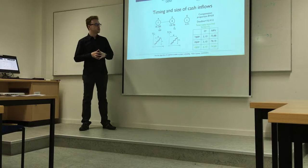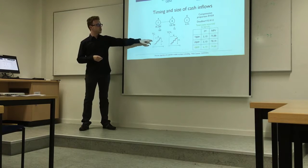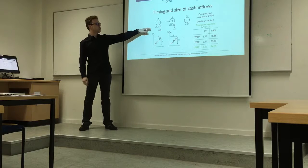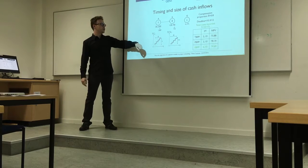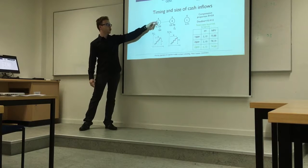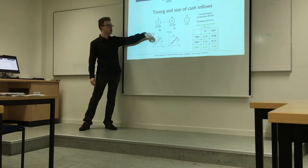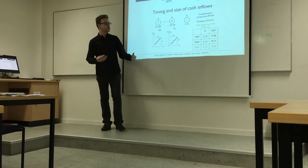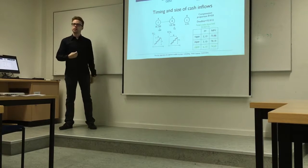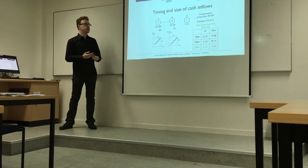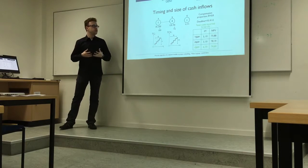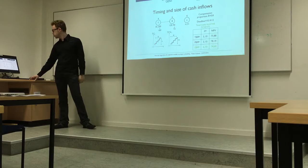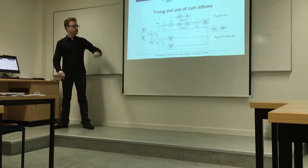The expense-based payment pattern determines payment times from total cost curves. At time 4 when the first activity finishes, total cost is 30, which is insufficient to trigger a payment, so we wait until time 6. In this example, the progress-based payment pattern leads to the best NPV results, though this is not generalizable — it simply illustrates how the three different payment models can behave differently.